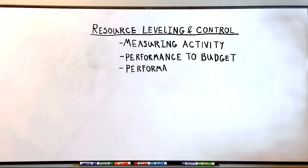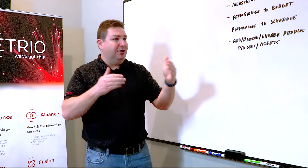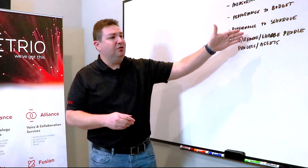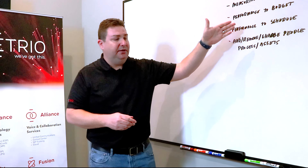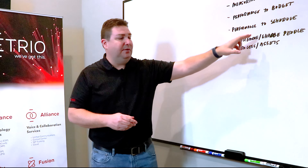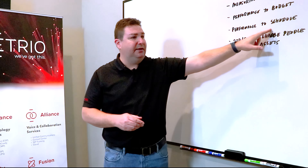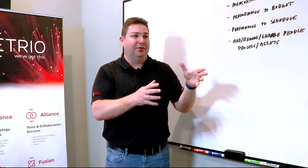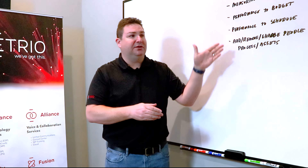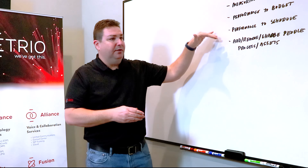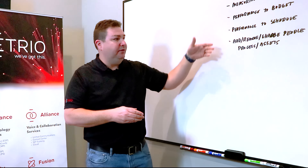We also want to look at performance to schedule. The difference between importance and urgency comes into play here a lot. Our performance to schedule may be more important than our performance to budget. So if I've got a hard deadline — say in an acquisition — and I'm trying to meet a timeline, then maybe my budget can flex a little bit so I can add a resource at an hourly cost into the middle of the project to speed it up or to make sure we hit our timeline. Those are all important attributes of resource leveling.